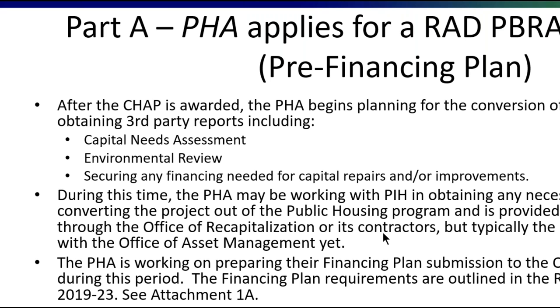So when the CHAP is issued, then it is the PHA that will begin their process in putting their packets together. That's their third-party reports, like the CNA, the environmental review, and securing any financing that will be needed to address the capital repairs and or improvements. During that time, you will be aware by the automatic email, but the Office of RECAP really is not yet involved. The PHA is working directly, and should they need assistance, especially the small PHAs, then RECAP has made technical assistance available for them in order to be able to put that packet together.